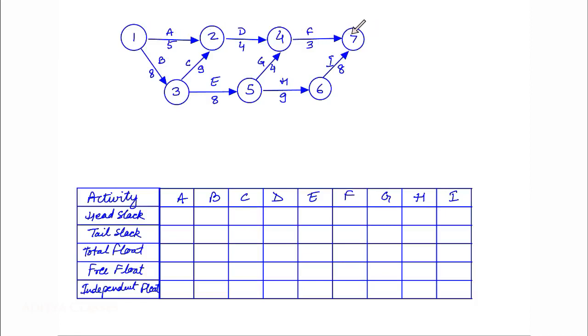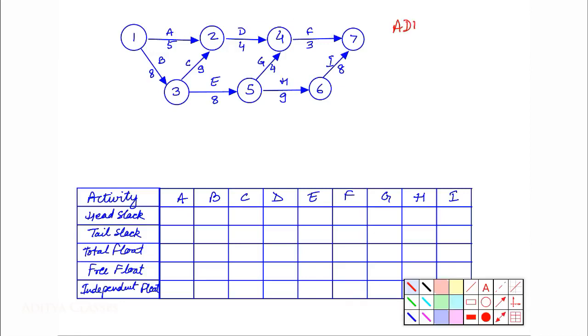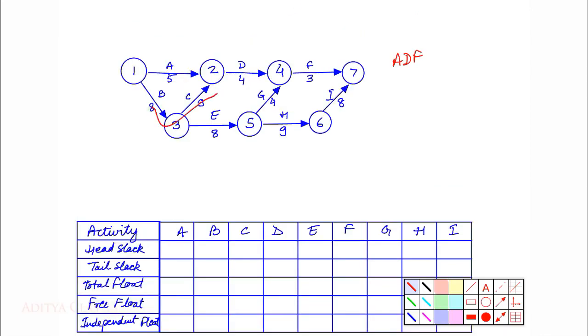First step is finding various possible paths from 1st to 7th event. We have 1, 2, 4, 7 that is ADF. Then we have BCDF. What would be the duration for this path? It would be 8 plus 9, 17, and 4, 21, and 3, 24. So our path BCDF has duration 24. What is the duration for ADF? It was 5 and 4, 9 and 3, 12.